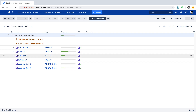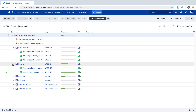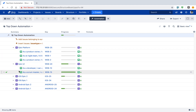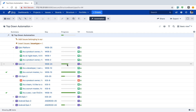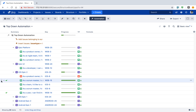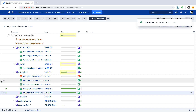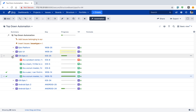Once you apply, you can see that the epics added earlier are now able to show the stories under them. This looks really good because not only can you see the stories under the epics, but you can also see the overall progress of the epic based on the progress of the stories. You can also make changes — for example, drag a story from one epic to another epic, and the same will be updated in your Jira project. This is how you create a Top Down Automation structure board.